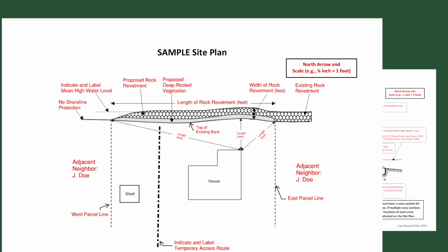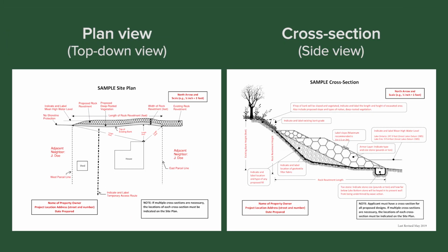Each application must include drawings showing the proposed work. These must be provided in a top-down view, known as a plan view, and a side view, known as a cross-section.